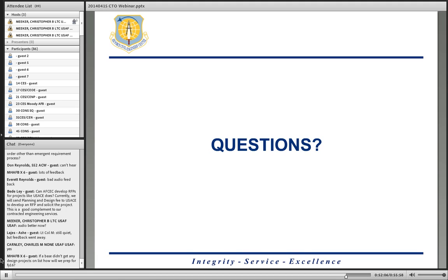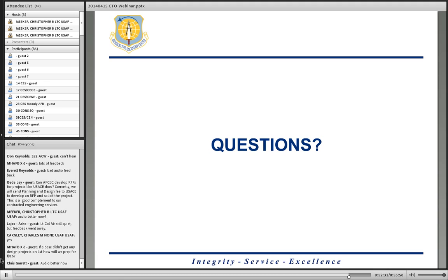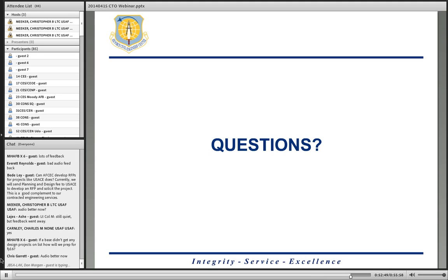All right, next question: if a base didn't get any design projects on the list, how will we prep for FY16? We have not issued any design dollars for FY16 requirements yet. In mid-May, when we pull that list, hopefully you have populated your requirements. Any requirement that you need design dollars on, you've updated ACES accordingly. If you've done that, when we pull that list, and if your project looks like it's in the window for FY16 execution, we're going to identify those designs then. So you haven't missed the boat for FY16.